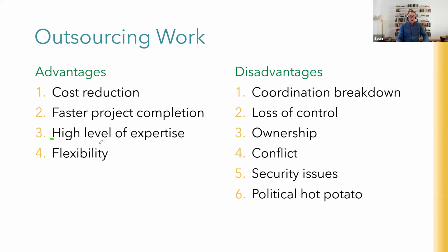You can also contract in immediately a high level of expertise rather than trying to build it yourself over time. And it does give you some flexibility, particularly if you just need things for short-term engagement. So you only need electricians for 3 months on a 2-year project, or you only need software developers or a particular type of software developer at the beginning of the project or the middle of the project. So you've got flexibility there. You don't have to commit to employing people long-term or buying machinery that at the end you have to dispose of.